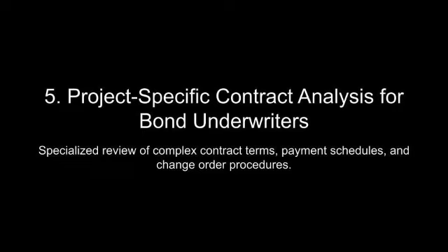However, lax or overly complex notification requirements can create significant challenges. For instance, contractors may miss deadlines for submitting notices due to bureaucratic delays, rendering their claims invalid under strict interpretation of the contract. Such situations often result in stalled projects, with the surety caught in the crossfire of competing interpretations of contractual intent.